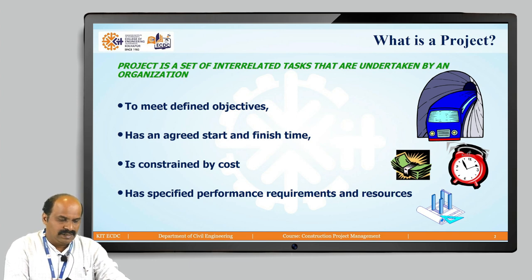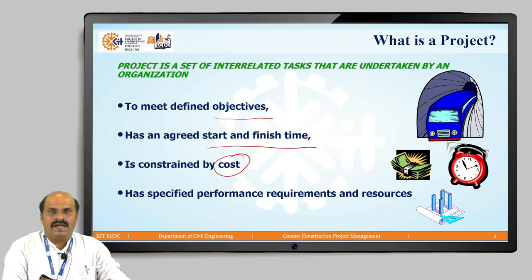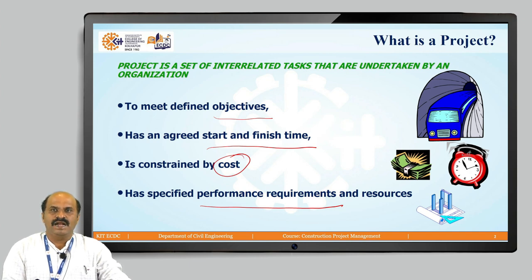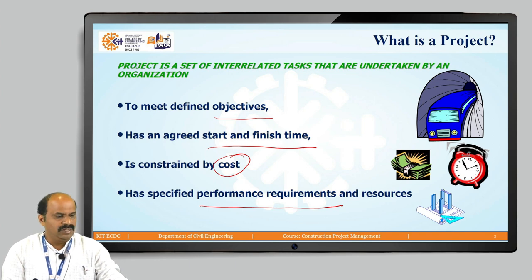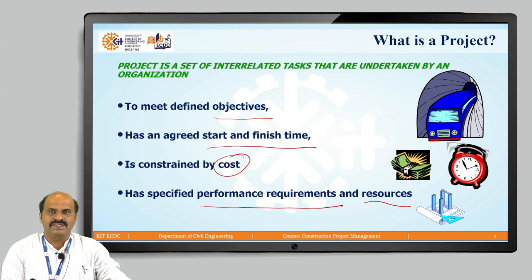The four characteristics visible in this slide — objectives, start and finish time, cost, and performance requirements — are the four criteria that separate a process from a project. A project has to have some objective, a start and finish time, a cost constraint, and performance requirements totally related to the quality of output expected. You may also have specified resources deployed for that particular project. These four or five things decide what constitutes a project and separate it from a process.